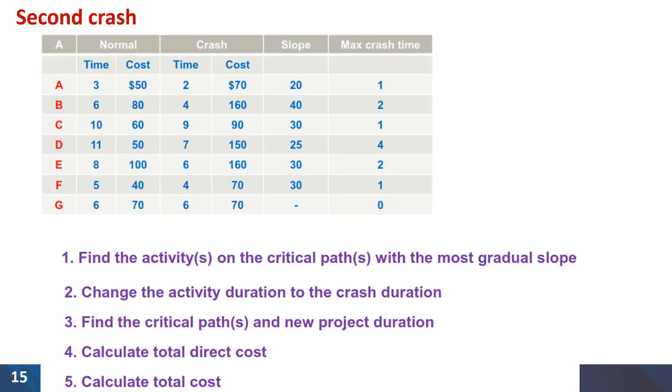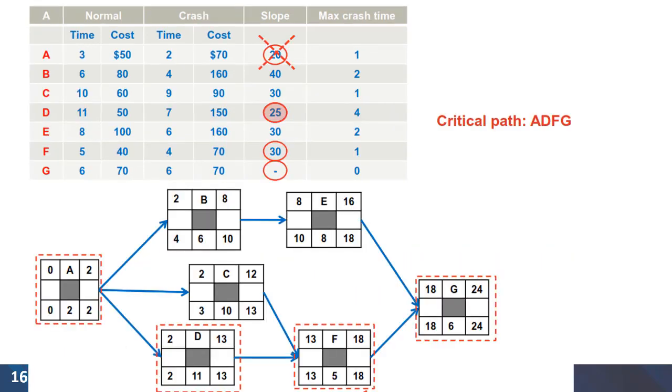We will follow the steps again. In this situation we have four activities that are on the critical path and the best choice is activity D with the slope of 25.